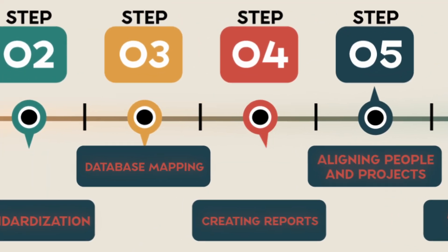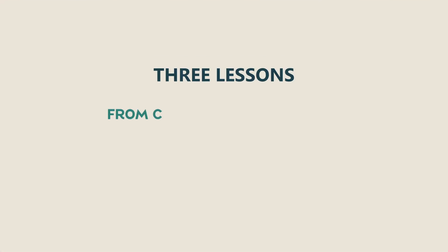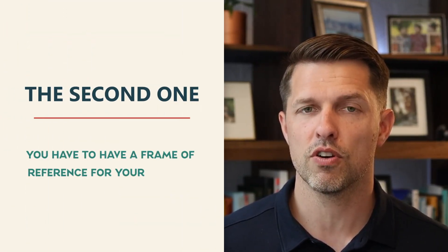Let's move on to step four, which is creating the report. I'm not going to tell you there's one report or one metric that rules them all — depending on your industry and your portfolio, there is a wide range of reports that can be high value and high impact. But here are three lessons from creating thousands of reports across my career. The first one: less is more. Every single report or dashboard should probably only have one to two pieces of data. Anything more will completely overwhelm your audience — you don't need the spaceship control panel with 47 different widgets.